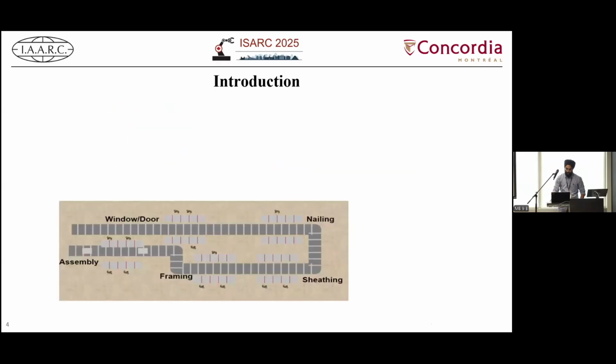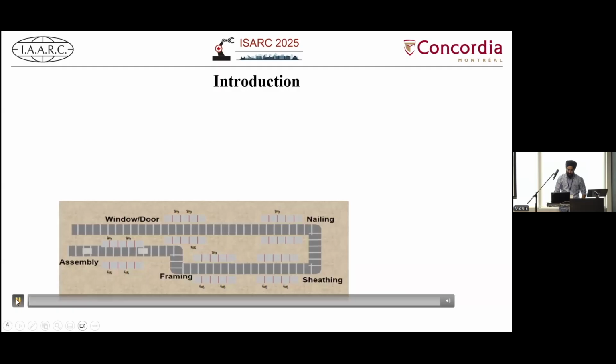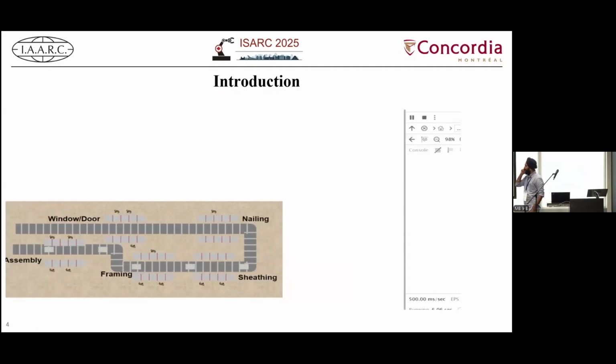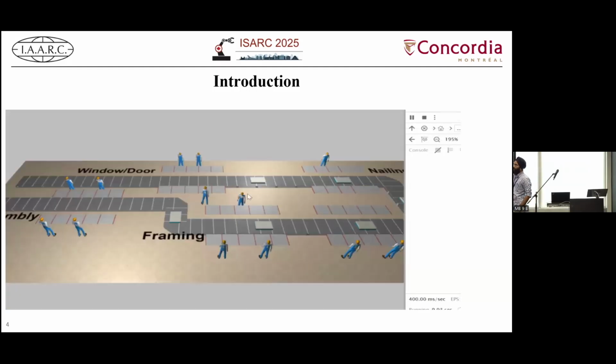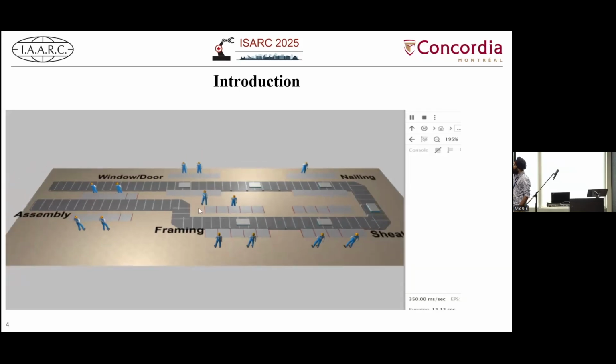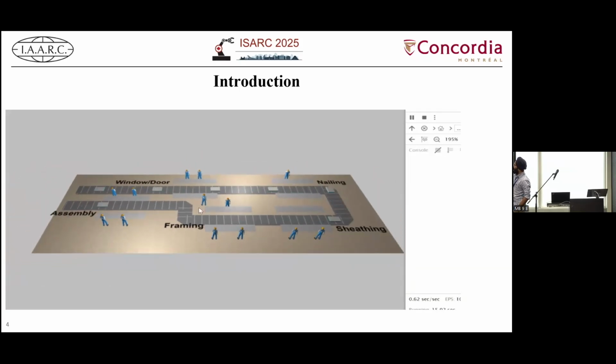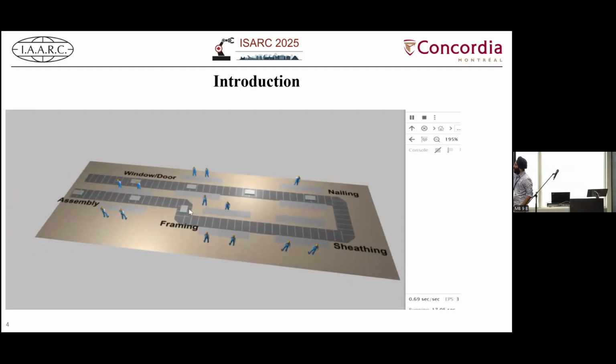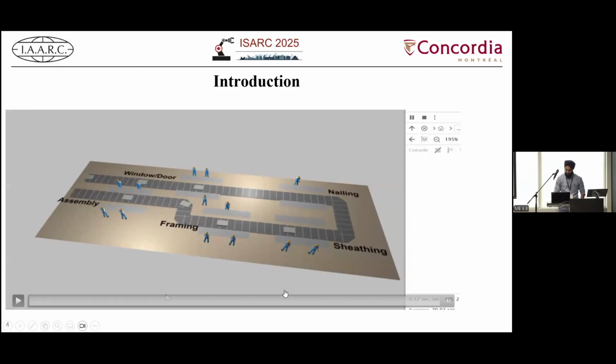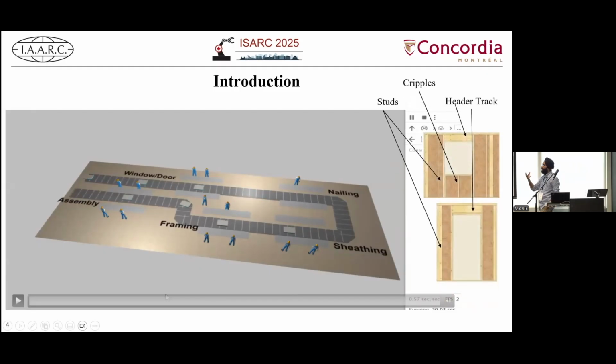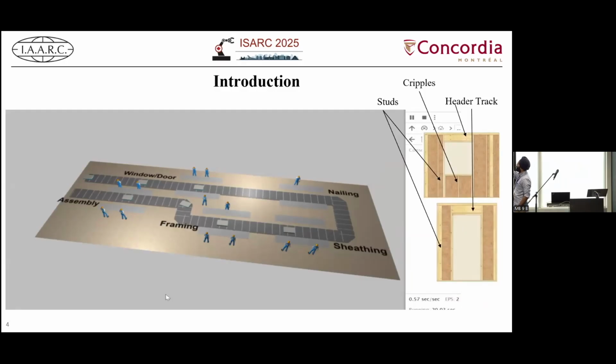The second one is an n8n automation workflow, and the third one is MS Project. So this is what it looks like during execution. The site staff took the image and uploaded it, which stores it in the repository. Then the management refreshes the report. Then the automation starts, pulling data from the repository, interpreting the information, and finally generating a report. The report is sent back to the management using the Telegram chatbot again,